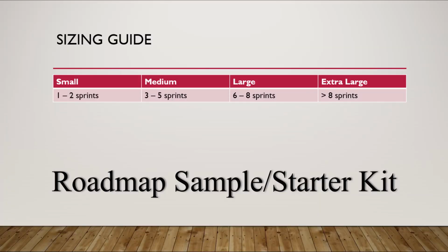Now, ideally, this big chunk of work should be divided in a way that it is consumable by each team. The sizing that we're going to look at here is anywhere between something that will fit into, I would say, a sprint to maybe multiple sprints. So the sizing that we use is usually T-shirt sizing in this planning. So we're going to do small, medium, large, or extra large.